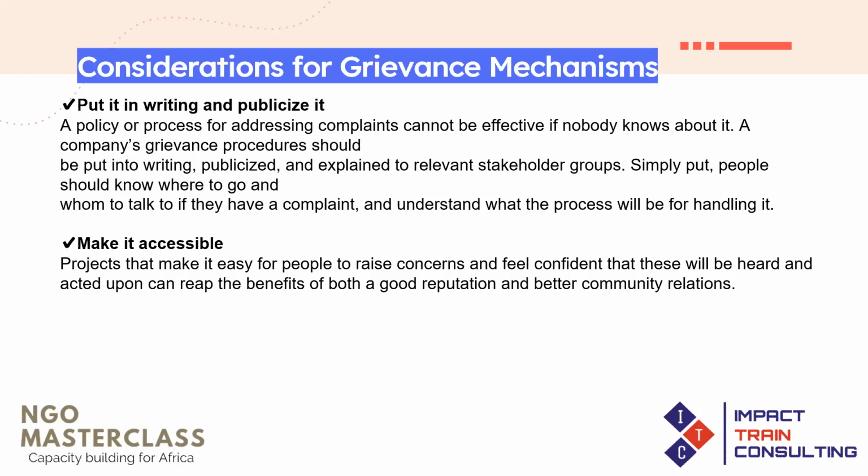You need to always go out and request for complaints. Sometimes I talk to organizations, and they tell me we have a toll-free line, but nobody has called. If nobody has called you, or if nobody has dropped any complaint in your suggestion boxes, it doesn't mean that there are no grievances or there are no issues, but it just means that maybe that channel is not the appropriate channel for the people.